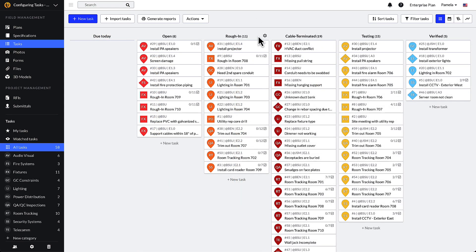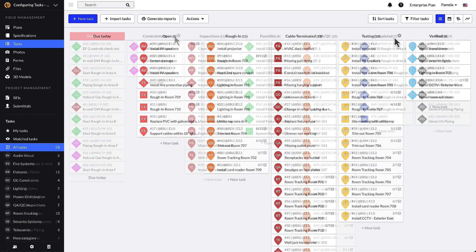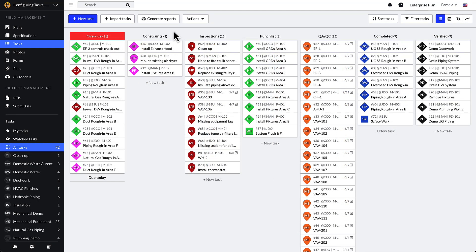Example phases are rough in, cable terminated, and testing. Process examples can include constraints, inspections, punch list, or QA/QC.